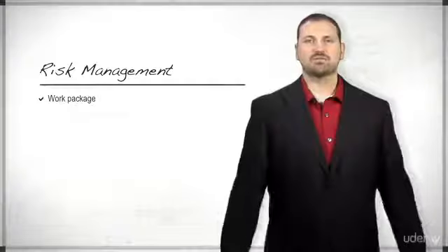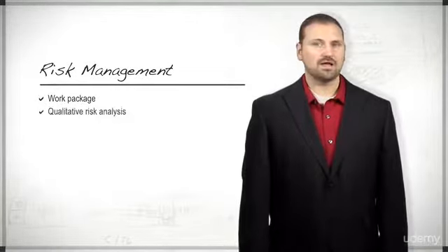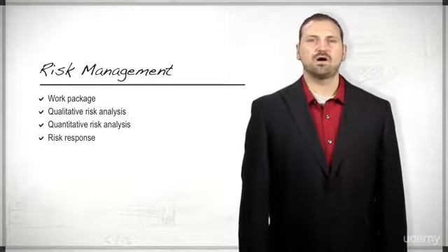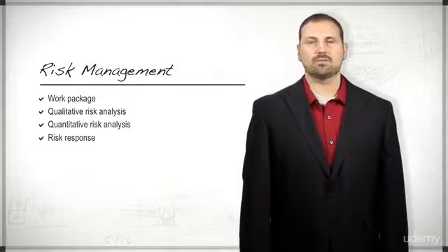During the planning process, the majority of risk processes are driven to ensure that all potential risks are considered at the work package level. Think about it. If you ask the question about potential risks for each activity that develops a work package, then you can develop a risk log that correlates to the project schedule and manage potential risks based upon probability and impact. The risk management subsidiary plan, identification of risks at the work package level, qualitative and quantitative risk analysis, and risk response planning are all risk-related processes that occur within the planning process group.